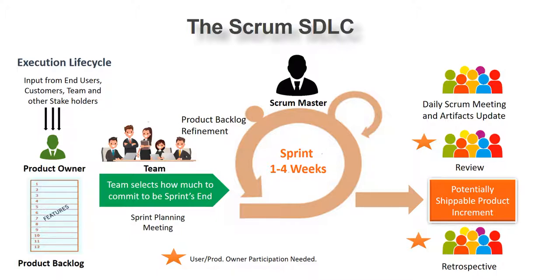This is the ceremony, this is the meeting through which the client has a daily visibility into the project. How? Because what happens in this ceremony is you talk about three things only. What did I do today? What will I do tomorrow? Any impediments that I am facing? When you're talking only about these three questions, everybody gets visibility as to how things are progressing in the project. And this call is on a daily basis. Hence, on a daily basis, everybody is getting insight into the progress of the project.